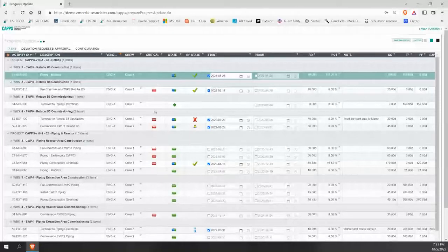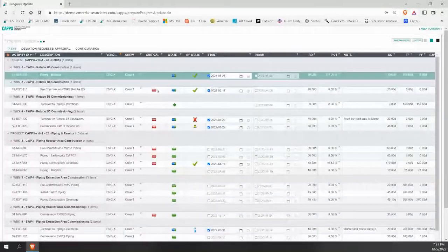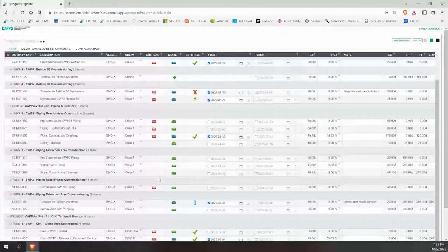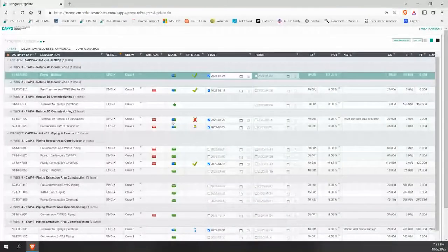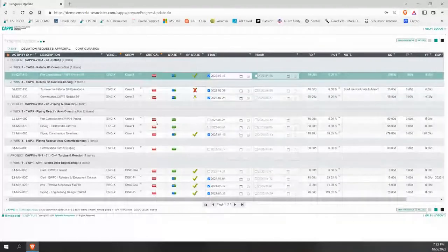And we added a little bit of hopefully helpful field here called critical. So we should have red. We should have some oranges. I'm not seeing any right now. And that would be like a near critical. So that's usually within 2 weeks, something like that, but it's configurable. So you have an idea of which ones are a problem here, okay? Or you need a bit more attention. So you could very, very quickly just get those critical activities here and look at those too.